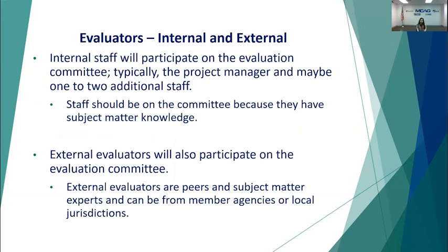Evaluators, internal and external. Internal staff will participate on the evaluation committee. Typically, the project manager participates, and maybe one or two additional internal staff. Staff should be on the committee because they have subject matter knowledge. External evaluators will also participate on the evaluation committee, and this is part of our policy as well. External evaluators are peers and subject matter experts and can be from member agencies or local jurisdictions.